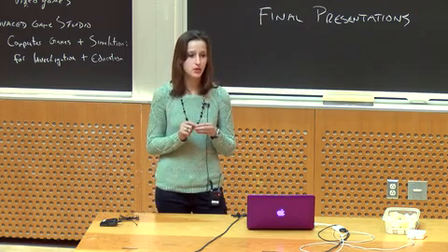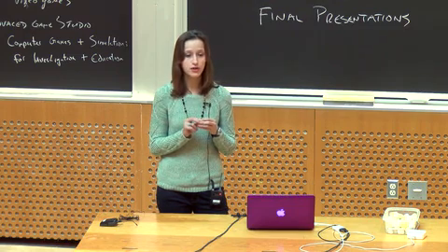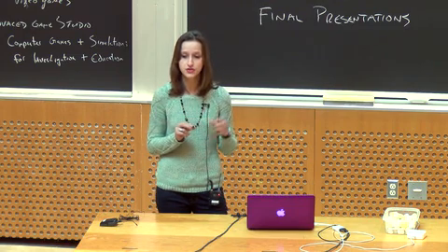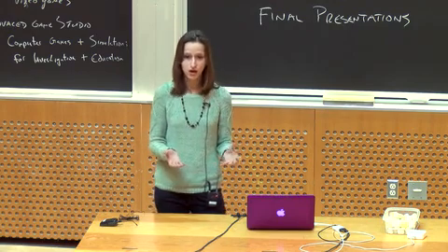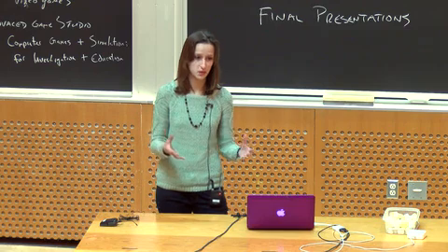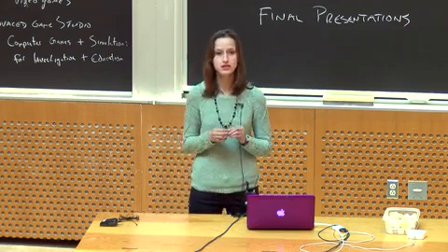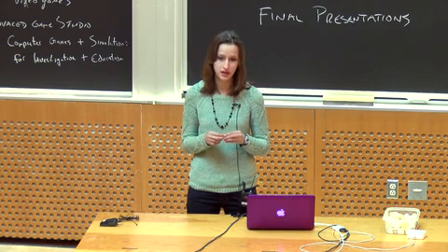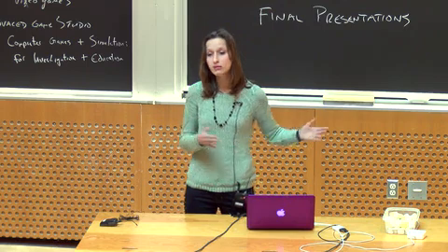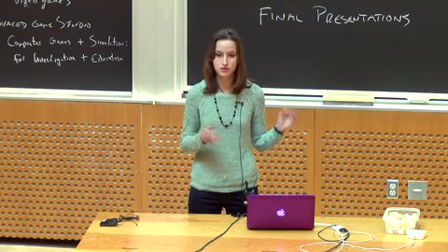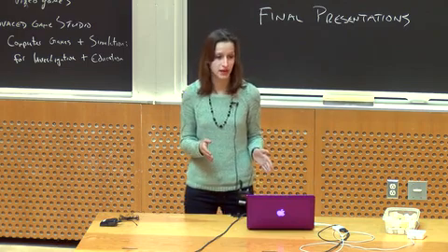How much work is it going to be to change the system to fit our game? And also, are we going to have time to do all of that and also focus on making the game complete as a whole instead of just showcasing this one aspect? It turns out it was a bit of a pitfall for us because we didn't expect it to take as much time as it did. And if we were to go back, the team said, well, maybe we'd still do this and deal with the issues early on, but also maybe we should have just designed a simpler game